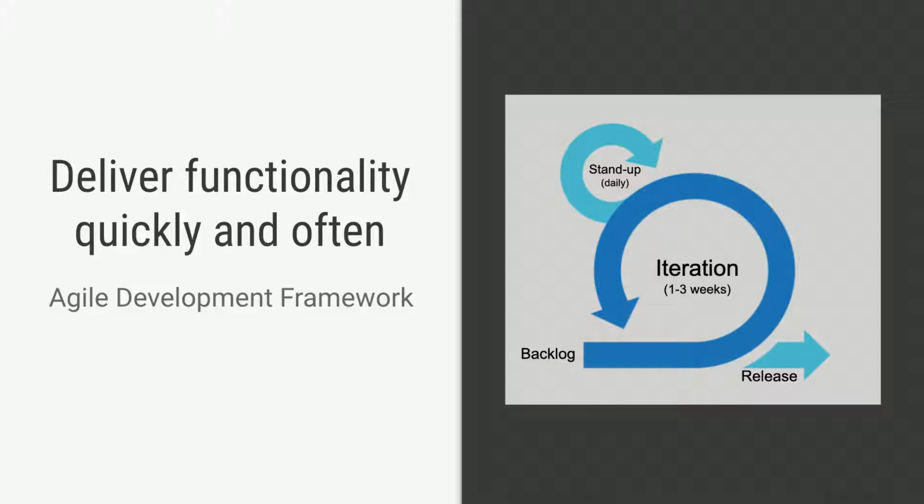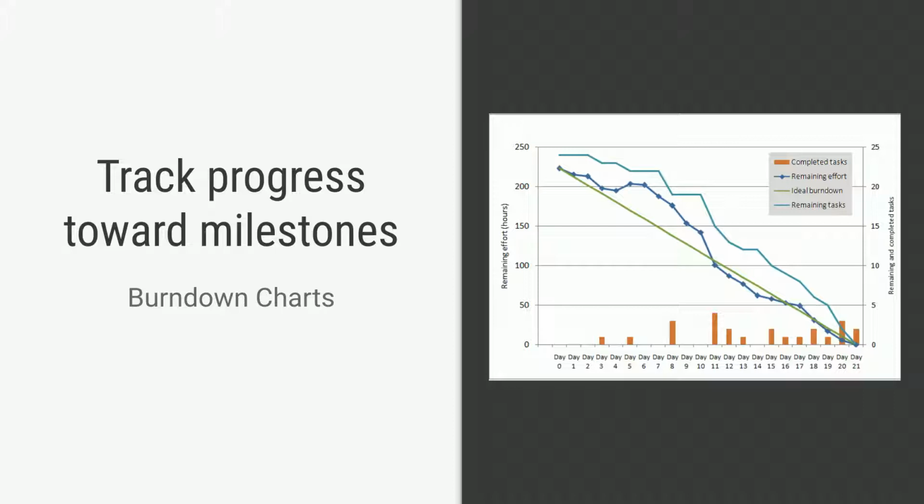The way that you generally operate within a given iteration is you have some number of tickets or tasks that you want to accomplish. You set that at the beginning, and then you keep that fixed throughout that time frame so that your priorities aren't shifting within a given time frame, and you're not doing a lot of context switching or putting something in cold storage and then having to come back to it 3 weeks later and figure out what your thought process was.